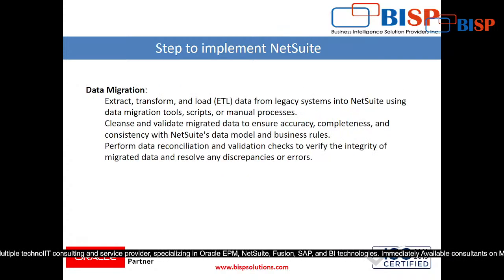Then data migration comes. Once you have designed the form, and implemented all the necessary information inside NetSuite, once you have tested one manual data entry and the data is inserted successfully, once you have tested the CSV upload and it is uploaded successfully, once you have done the mass updates using the mass update script and that is done successfully, and once you have tested all the test cases, now everything from every point of view is done.